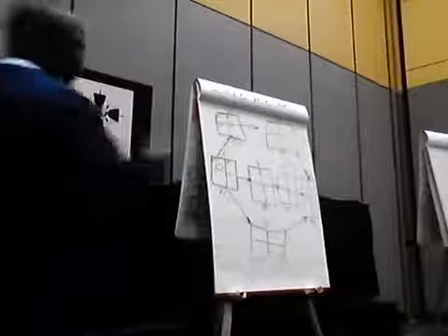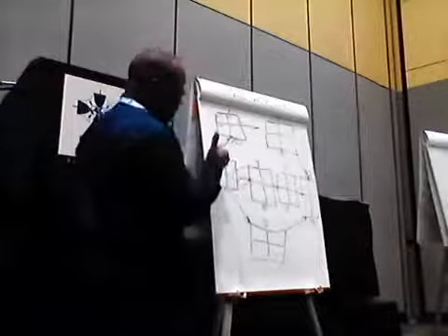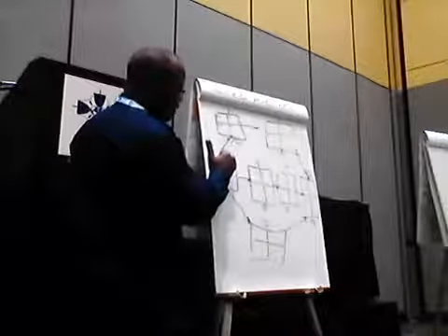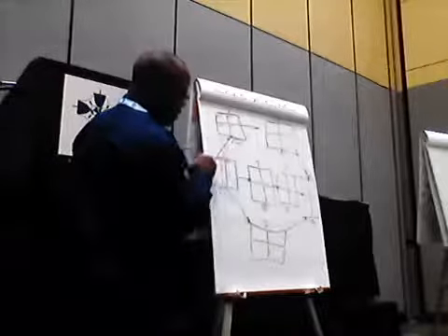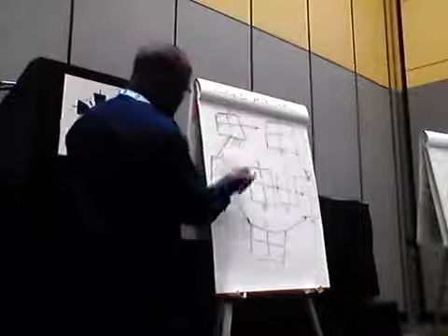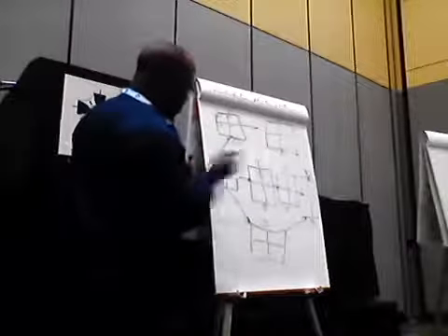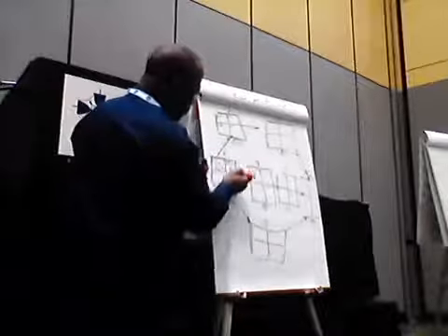Now, if you think about task A, it's taken a day, we started at point 0, the early finish is going to be the early start of 0 plus the duration. So just think of this plus this gives this. 0 plus 1 is 1. So you might want to write that in your sheets. Start at point 0, add 1, get 1. You could write a formula that says early start plus duration is equal to the early finish all the time. This is one of the little rules.